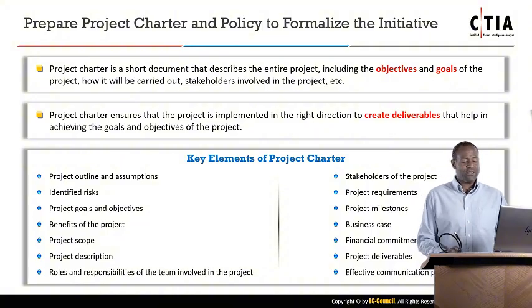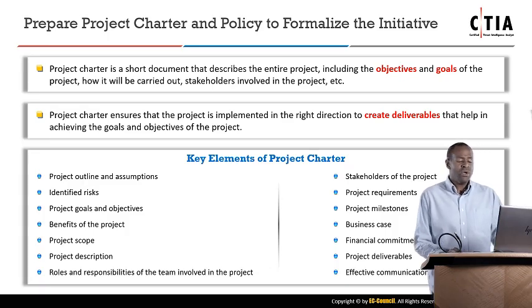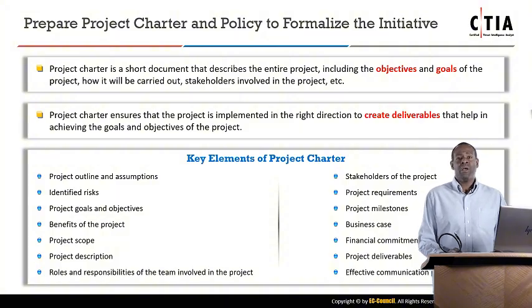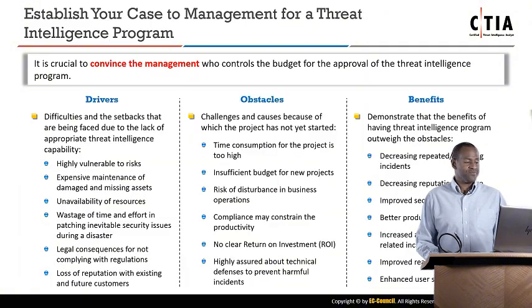And by the way, one more thing for the business case. Also, the fiduciary responsibility of your organization to safeguard its data and the integrity of communications might be a big reason to do this project. So business case. Next, we look at financial commitments. So this project is going to engender a whole string of financial commitments. What are those? Those need to be listed in the charter. We have project deliverables. And what is our communication plan? How are we going to communicate this to all the stakeholders and to every other entity that requires communication?